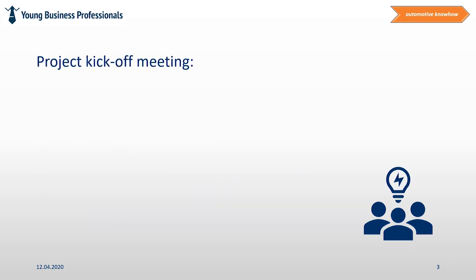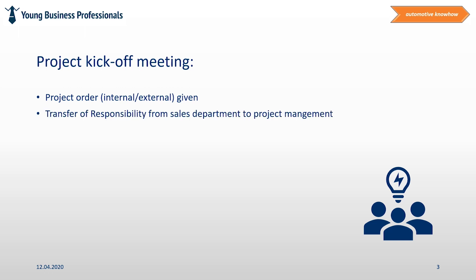The starting point of Phase 1 is the project kickoff meeting. This meeting gives the official project order to the project team. Typically, the whole future project team and members of the management are joining these meetings. The meeting symbolizes the handover of responsibility from the sales team to the project team. The scope of the project will be introduced roughly to the full team.